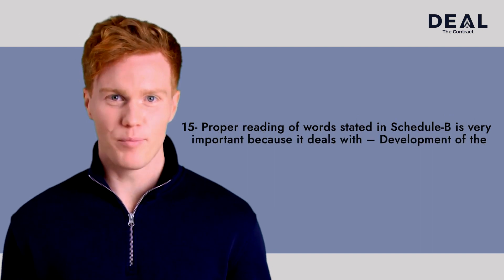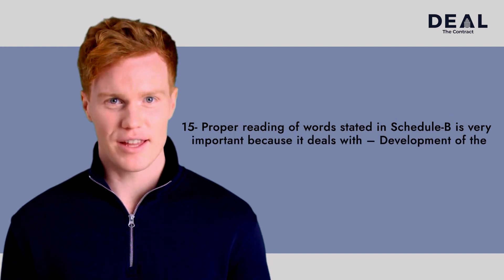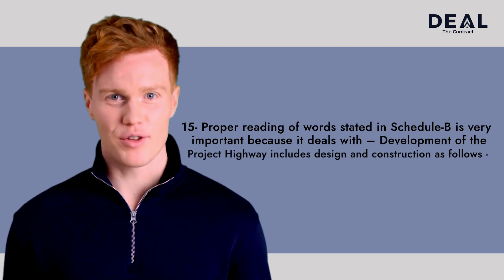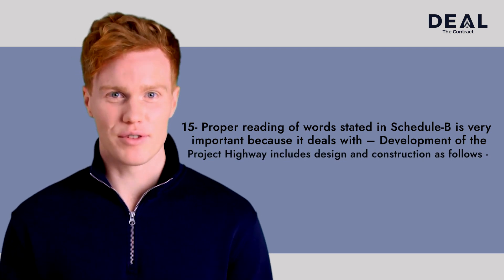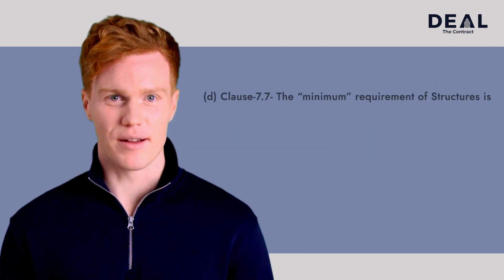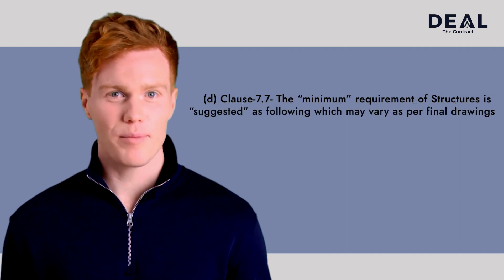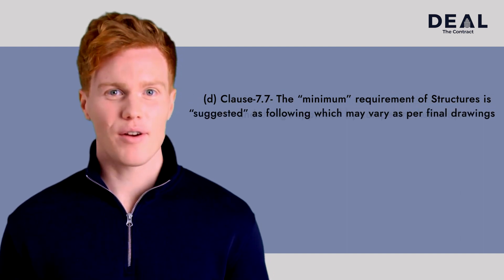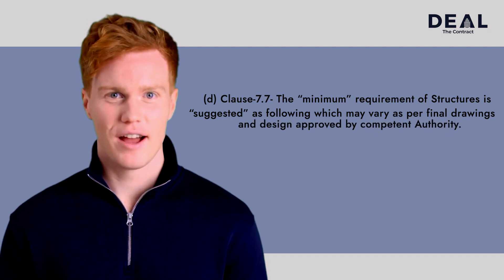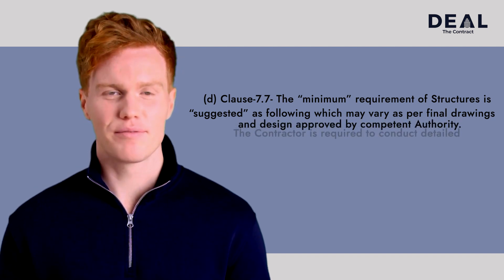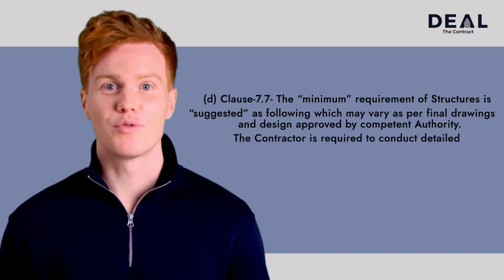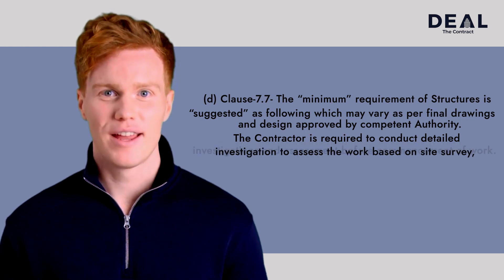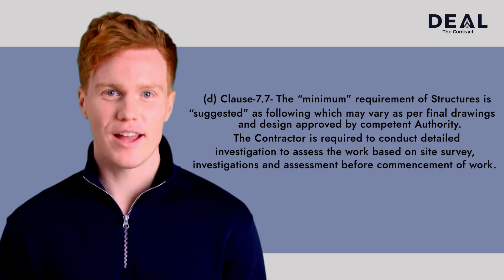The proper reading of words stated in Schedule B is very important because it deals with development of the project highway including design and construction. Clause 7.7 — the minimum requirement of structures is suggested as follows, which may vary as per final drawings and design approved by the competent authority. The contractor is required to conduct a detailed investigation to assess the work based on on-site surveys, investigations, and assessments before the commencement of work.